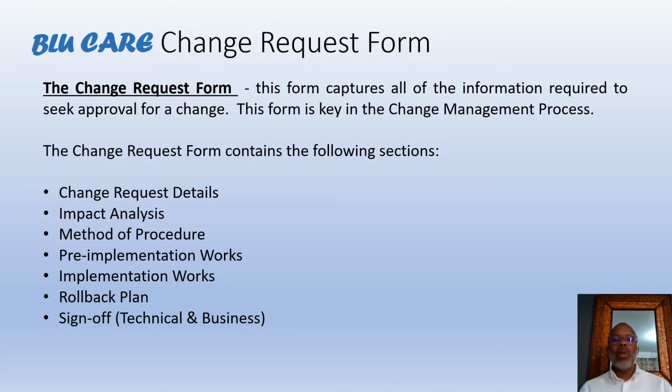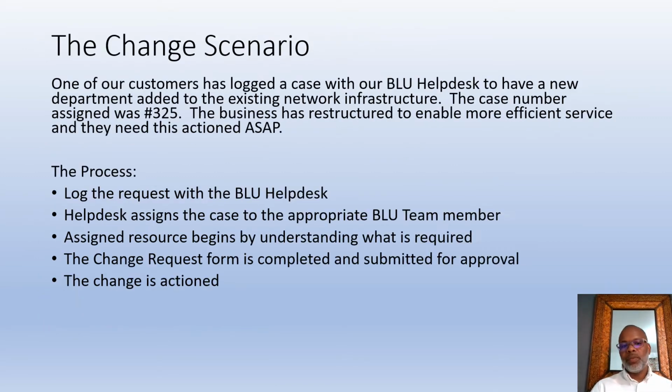So the first thing that we want to speak about is the change request form. The change request form is the form that starts out the entire change management process within the Blue Care framework. And this change request form captures all the requirements from a technical and a business perspective, right? And it contains the following sections: the details, the impact analysis, the MOP or method of procedure, pre-implementation and post-implementation works, rollback plan, and the sign-off from the technical area and the business or commercial area of the business.